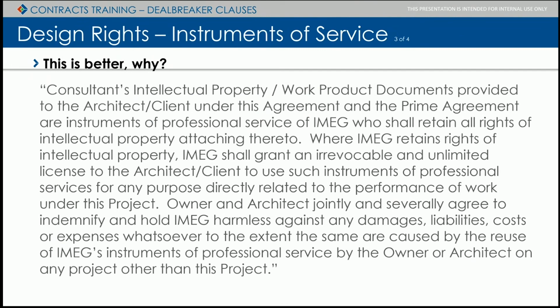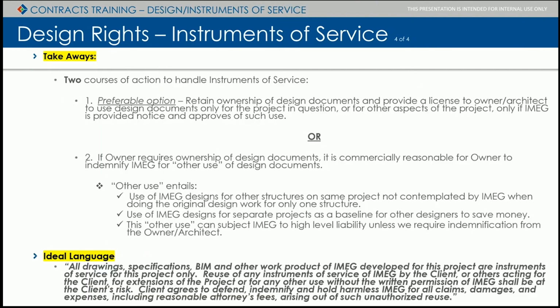And if they decide to breach that and go ahead and use it for something else, they expressly agree to indemnify and hold IMEG harmless against anything that happens. All right, so that's the ideal, maybe not practical, but ideal instruments of service clause, for educational purposes, of the ideal situation we're trying to get to, okay?